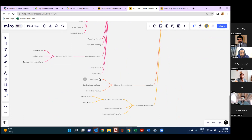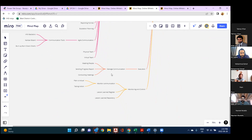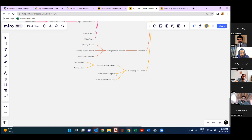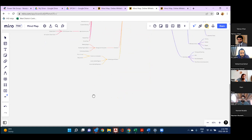We have the four R's of communication: right information to the right people for the right impact at the right time. In communication models, we have sender and receiver with a medium between them; anything disrupting information is called noise. Active listeners pay attention; passive listeners are present but not engaged. We also have reporting formats and escalation planning. In agile communication, we use information radiators, Kanban boards, and burn-up/burn-down charts. We need to determine whether teams are physical or virtual, as different mediums are needed. In execution, we manage communication through meetings, progress reports, and conducting sessions. In monitoring and control, we use lessons learned register and repository, and compare planned versus actual communication.